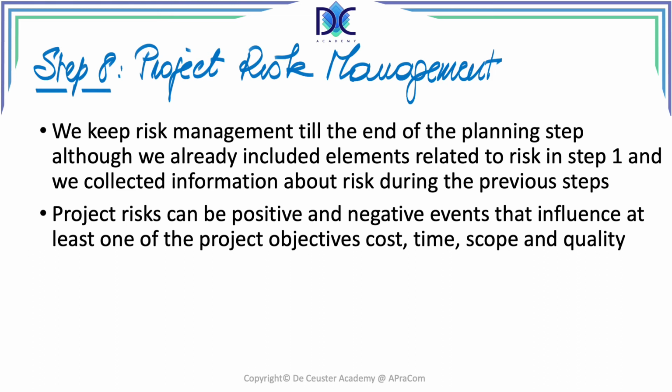Now, we have to be careful when we define risk management, because in general, when people talk about risk, they talk about negative events. In project management, we look at positive opportunities and negative threats that can influence at least one of the project objectives: cost, time, scope, and quality.